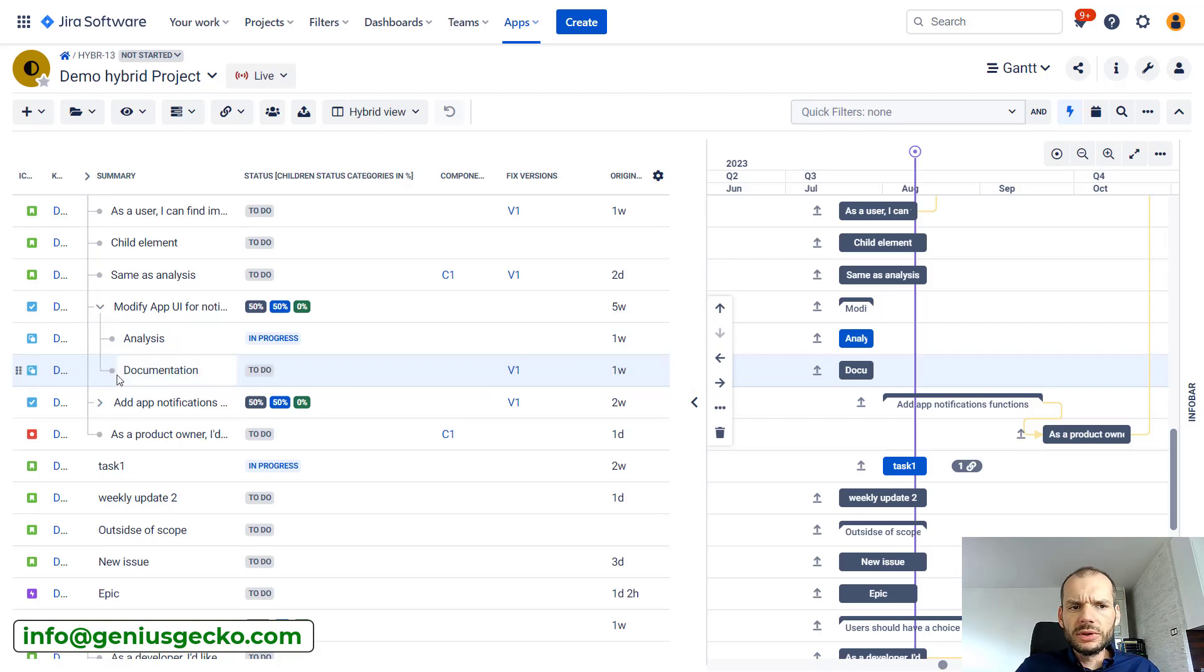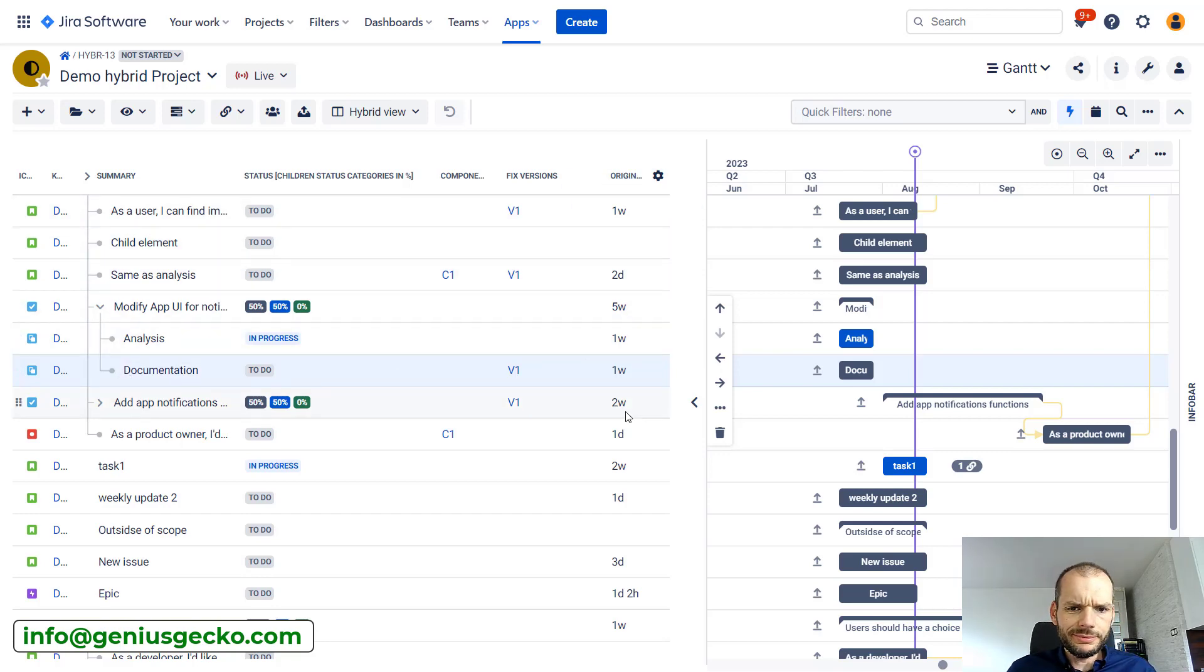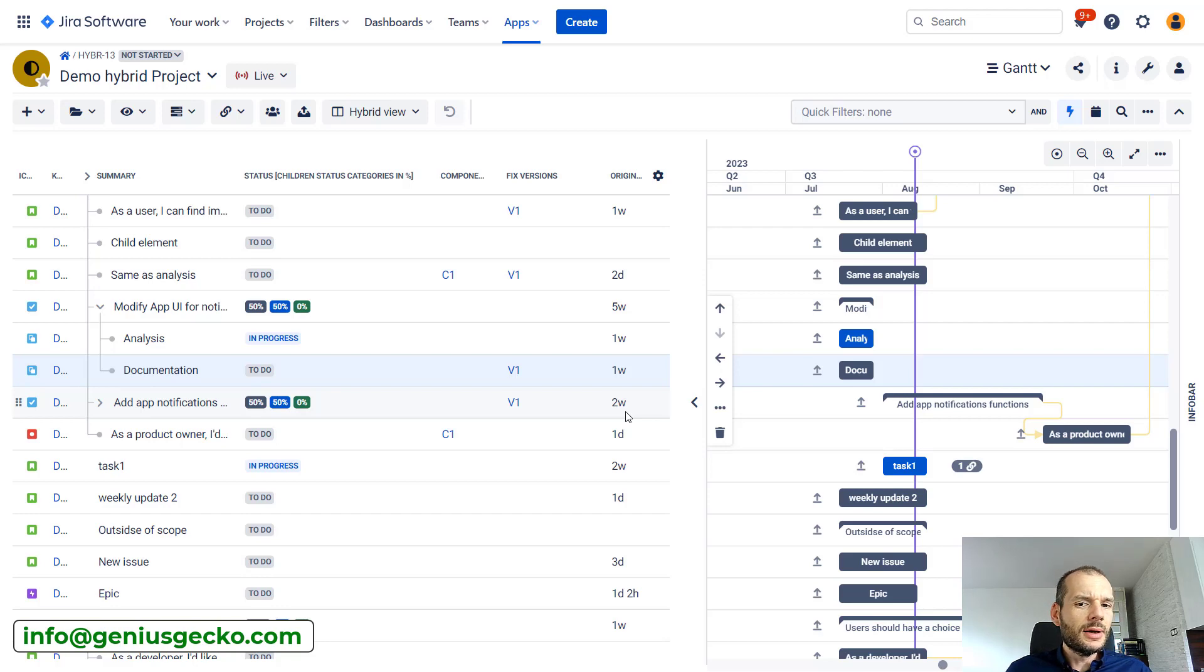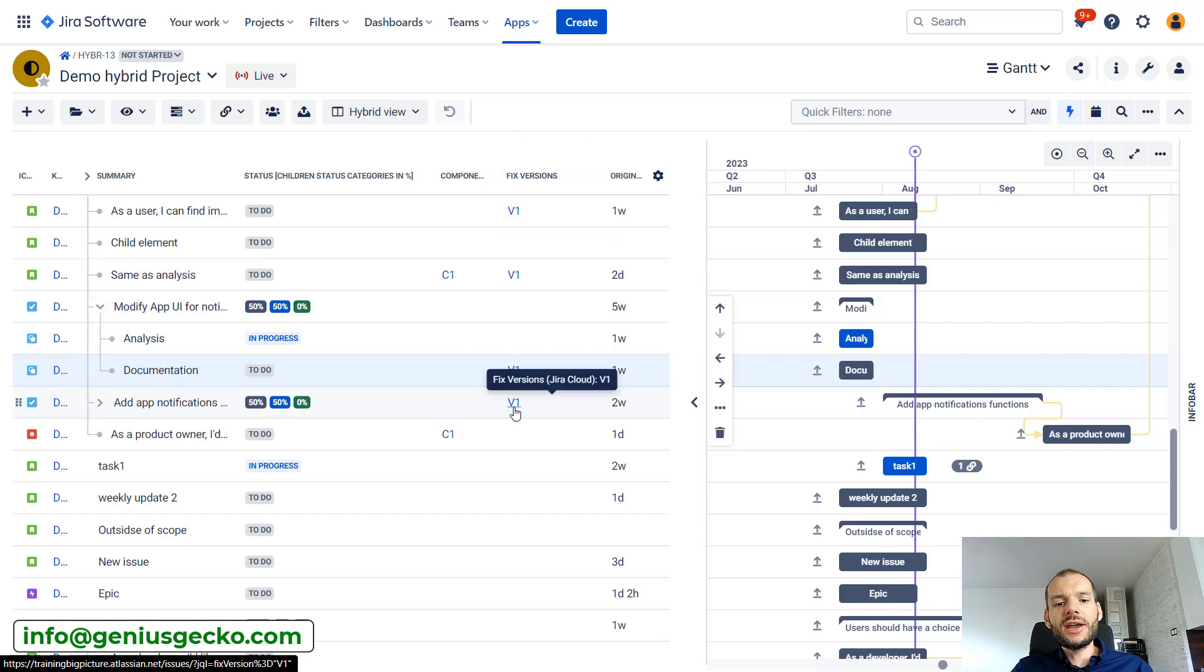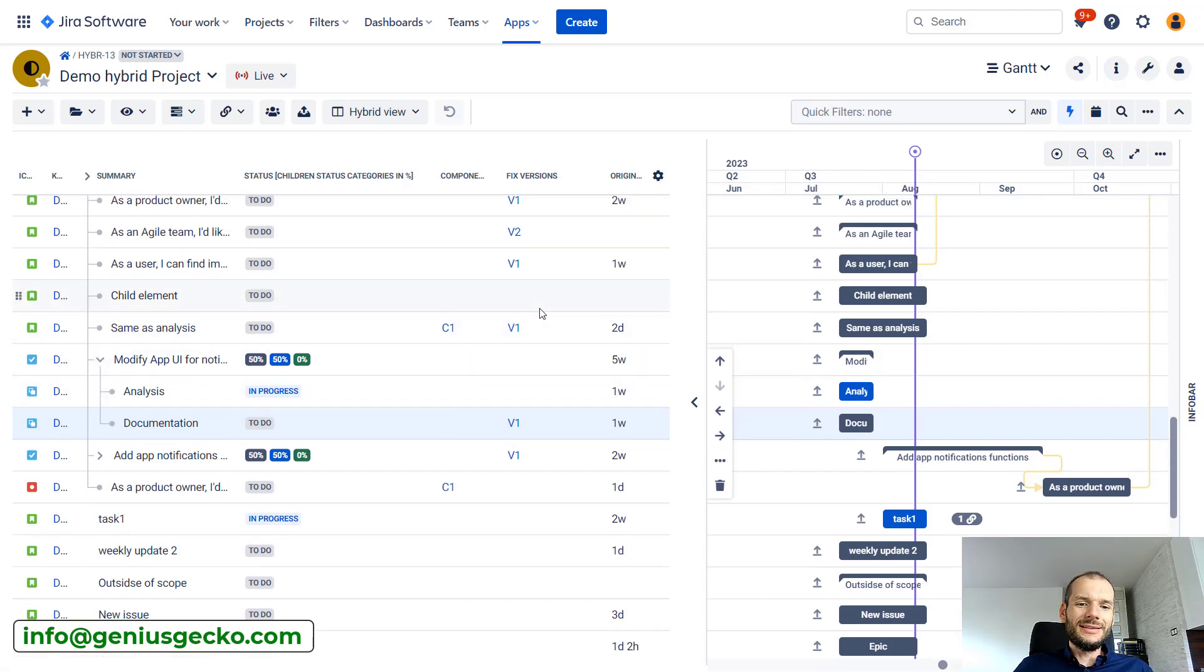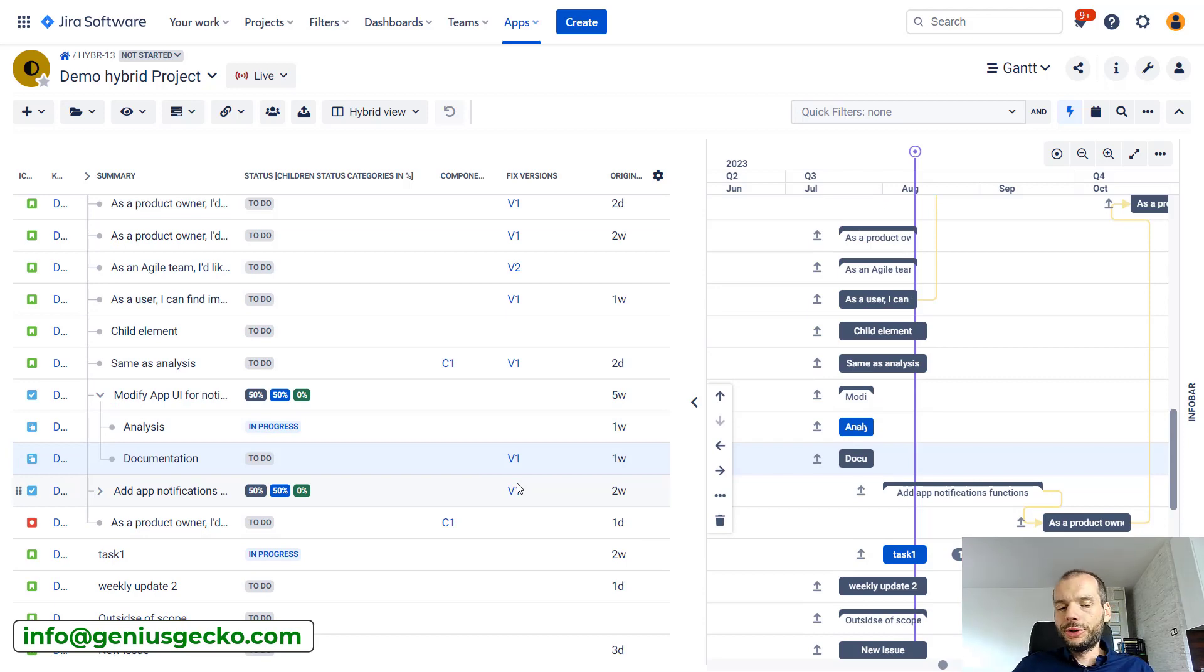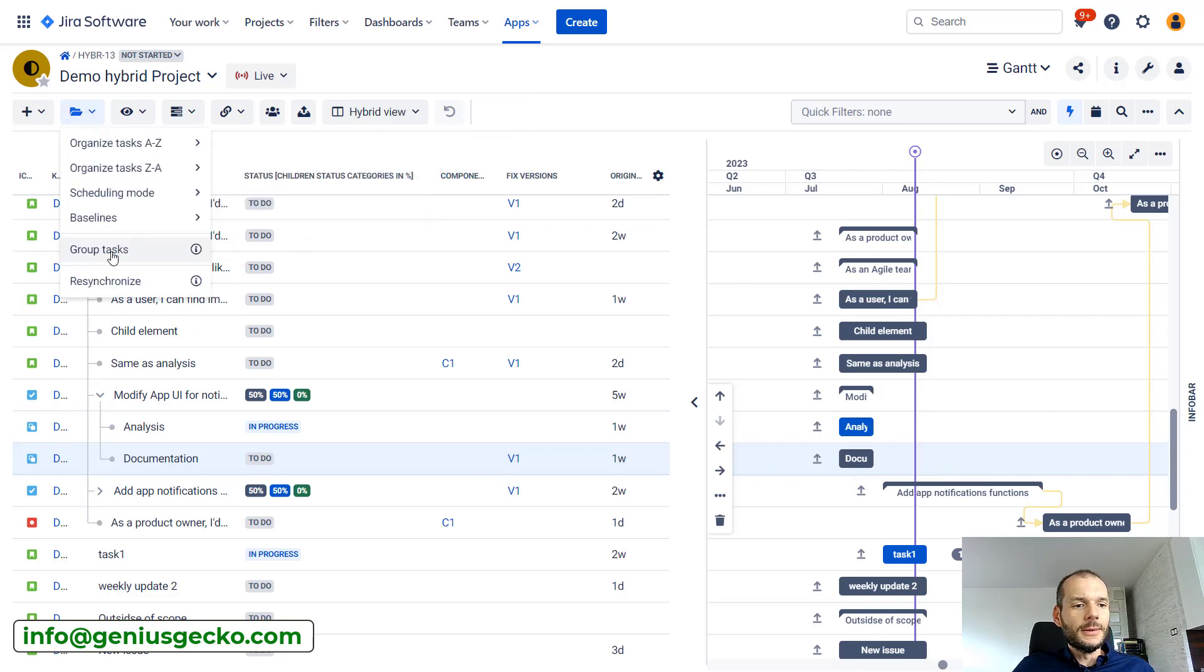But what if we would like to see aggregation of this information, of original estimate, from a different perspective? Let's say that I want to see how much estimated work is associated with a specific fixed version, so how much effort we need to spend to deliver that fixed version. It wouldn't be very easy now because tasks assigned to a specific fixed version are spread over the whole work breakdown structure. But this is where grouping comes handy.